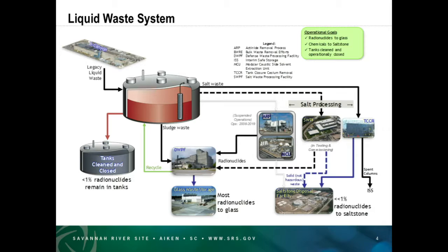You've seen this slide probably more than once today already, so I won't spend a lot of time on it. Just a couple of key items right here. Of course, you heard ARP/MCU was shut down in June in preparation for the tie-ins with Salt Waste Processing Facility. I'm sure Mark already briefed you that that tie-in work is going very, very well, and we will have everything done except the last connection of the pipes by the end of November, waiting on SWPF startup. Tim Tech was started up in, I think, late spring, and it's functional. So now we are waiting on salt waste processing to get up and running to finish the life cycle.